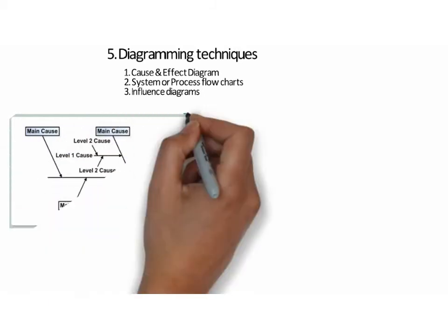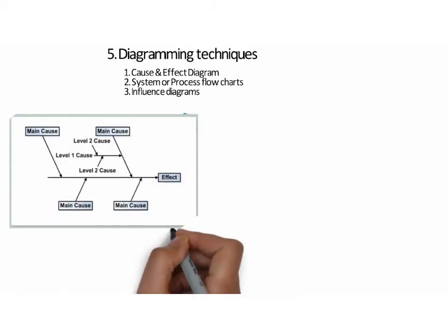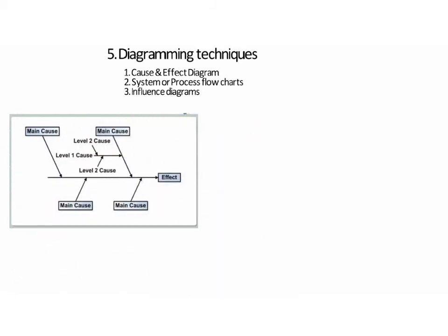Cause and effect diagram. Causes are arranged according to their levels of importance or details, resulting in a depiction of relationship and hierarchy of events. This process can help you search for root causes of composite risk events leading to common impacts such as schedule delays or cost overruns.